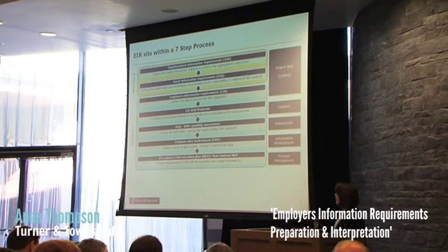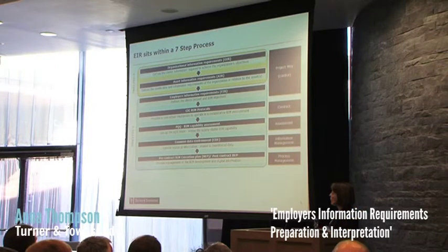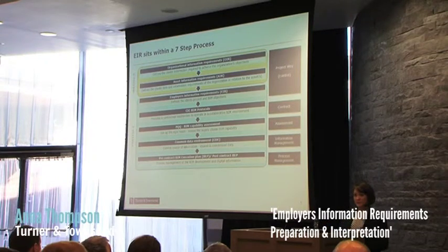So we have the OIR, which is the Organisational Information Requirements. It's looking at high-level organisational business objectives. And then that feeds down into the Asset Information Requirements document, the AIR. The one acronym I do like is PIM, because it reminds me of having a drink, but the rest of these don't. So the Asset Information Requirements document defines the client's information requirements at an organisational level. So what data is important to a client to be able to operate their assets. Now, that is all defined in PAS 1192-3.